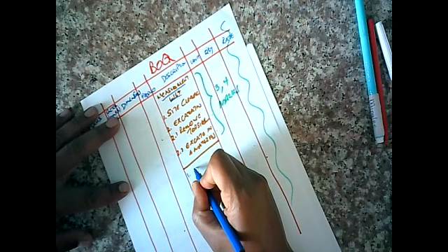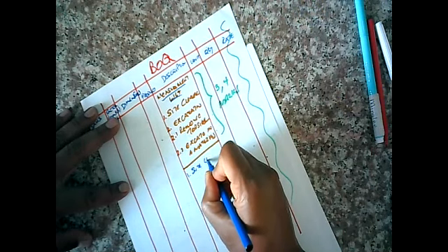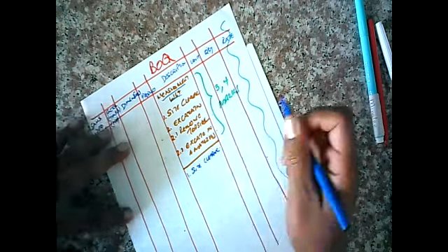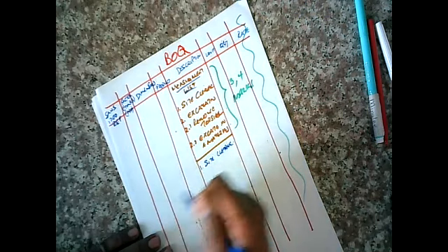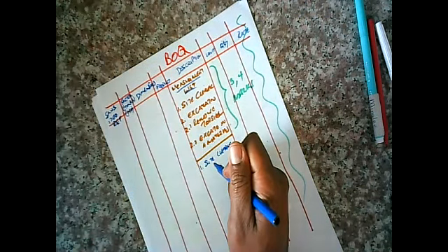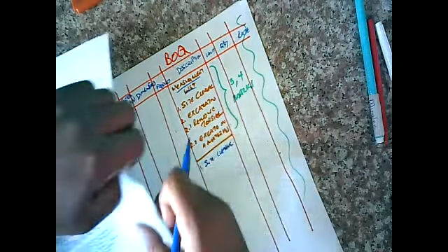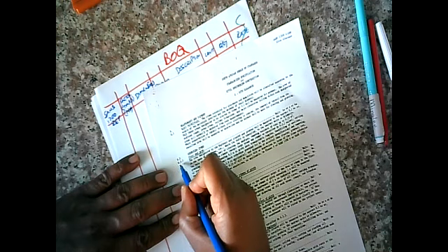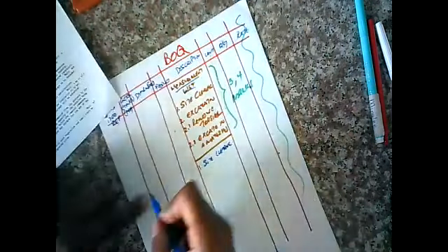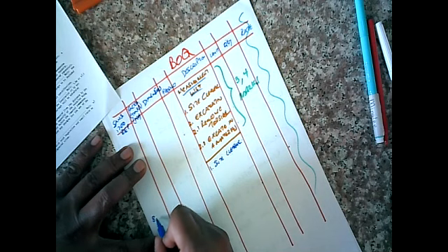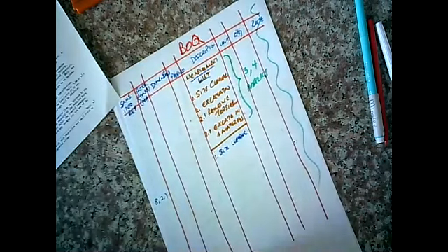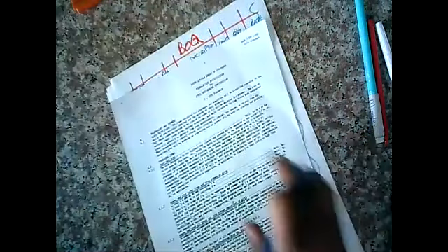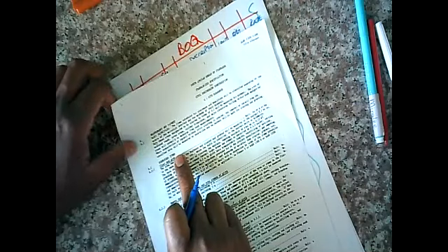All right, now let's tabulate this. 1, site clearance. All right, and under site clearance, what did we do? Let's go to our SANS reference for site clearance. Okay, there we go. 8.2.1 clear and grub. Under that, we've got 8.2.1. That's where I got it from. Site clearance, clear and grub.